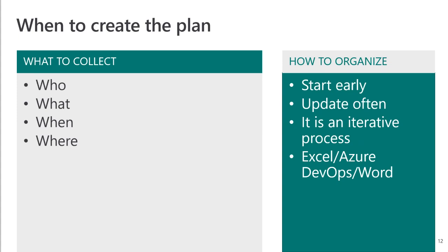If you wait until UAT is done and your project plan has 5 days allocated after the end of UAT to put your training plan together, you're probably going to be woefully unsuccessful in putting together a comprehensive training plan. So we recommend that you start putting your training plan together early, alongside the gathering of the requirements, which is usually one of those first steps that's happening.